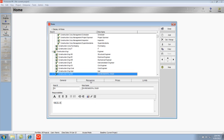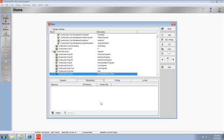My next step is to go to the Resources tab. And on the Resources tab, I can identify those resources who can fill this role, in this case, Environmental Engineer.